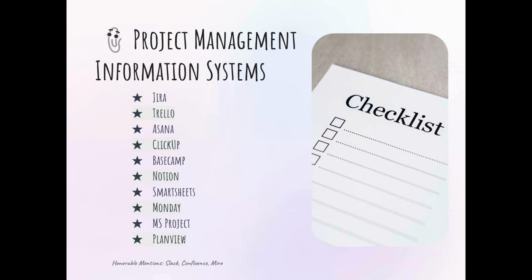I misunderstood your question originally, but if you're talking about issues like bug fixes, then I do lean back on Jira. While it does take a level of customization, you can have your backlog, your sprints, and then separately have bugs and issues that you tie to a task. Those issues will have separate due dates from the task, so they can be due before the task can be closed. And you can separately assign those issues to a developer for resolution, as opposed to whoever else was in charge of the rest of the task. If that's more in line with what you're saying. Yeah, okay. Thank you.